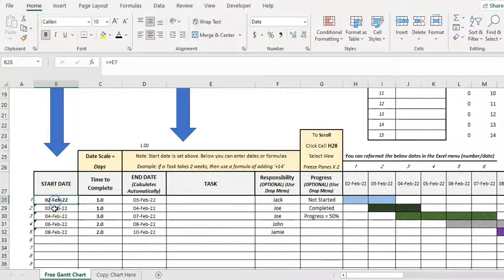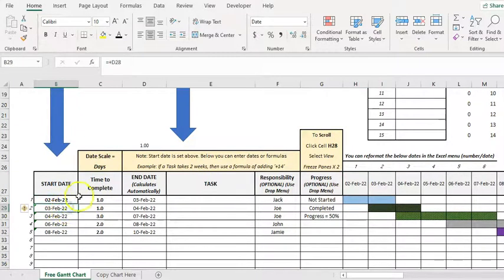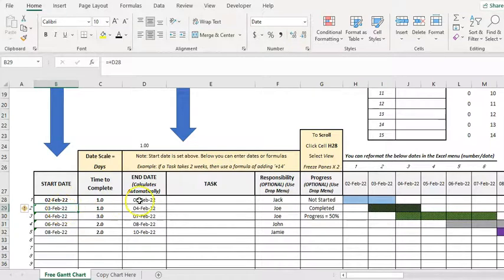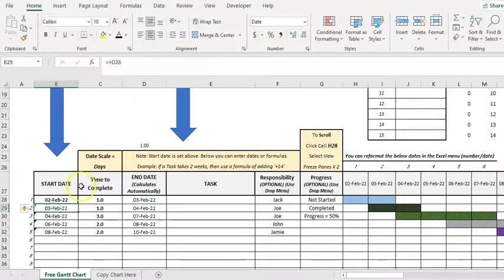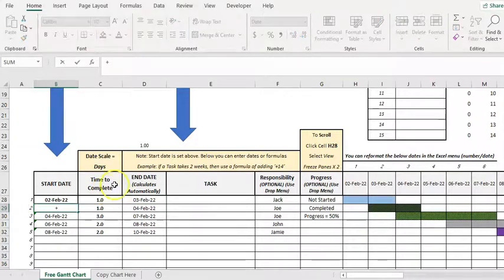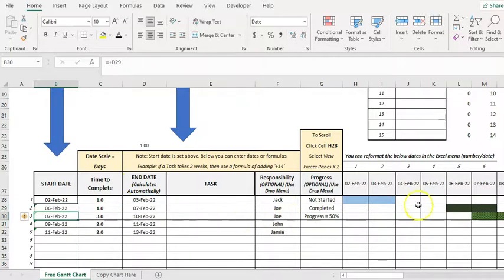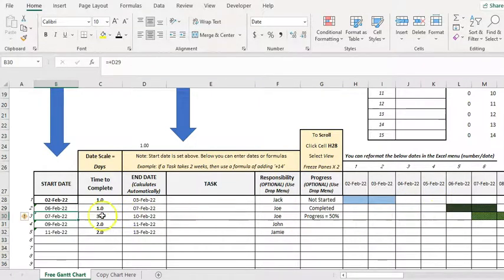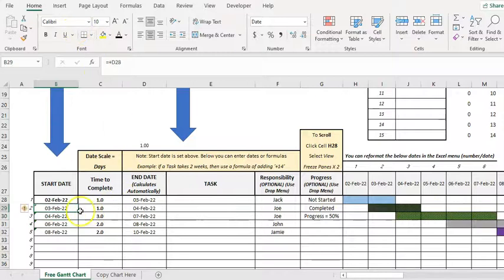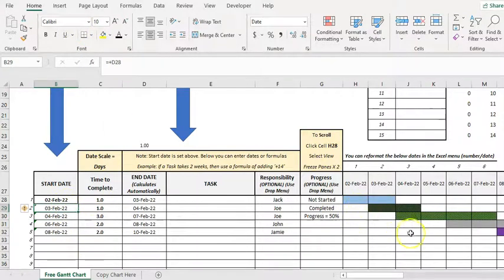Okay, and what I do here is that's fixed, but then I have formulas. So this start date starts at the end of that. So it's not actually a number. So I could say it starts three days later. So it's that plus three. And you can see there's a gap there, etc.